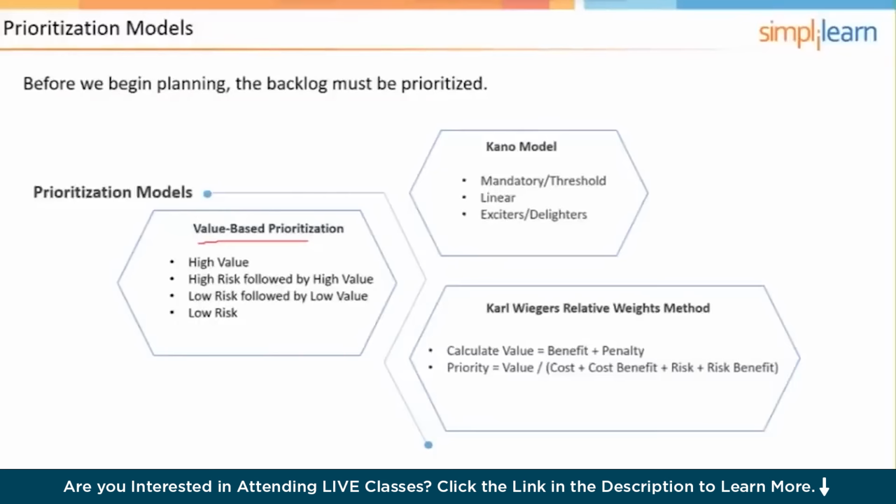So, we might have written this a little bit differently, but that's value-based prioritization, and this is primarily the product owner with maybe some input from the team, just simply deciding what he or she wants done most, listening to the team say, well, there are some greater risks with this user story than that. And so you'd probably want to persuade the product owner to take care of high risk stuff first, because that would have an impact on the future things that need to be done.